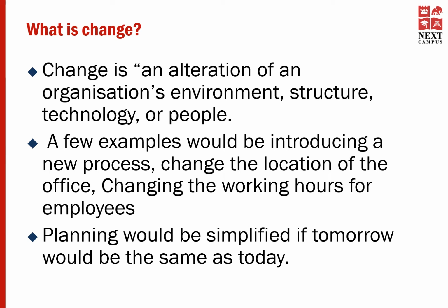However, in agile approaches, the whole focus is on responding to changes. Through inspection and adaptation, through shorter iterations, it allows the teams to try out something, and in case of a change, that change can easily be accommodated than in a traditional project environment.